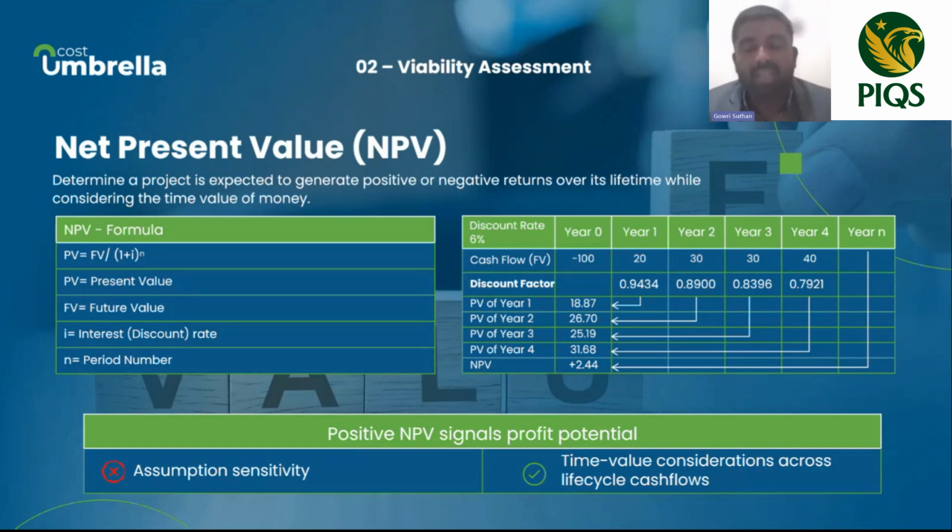So it's the same way, if you have 30 million in year two, if you take that 30 million to year zero, which is the year you invested, the real value of 30 million is 26.7. We have studied, right? You have to compare apple to apple, orange to orange. For example, you invest 100 million in 1 year, you are receiving returns in different years, and you add those different years and subtract, so you are missing one component, right? So apple to apple, you have to bring the real money value to the same year, then only you can compare. That is called NPV analysis, right?